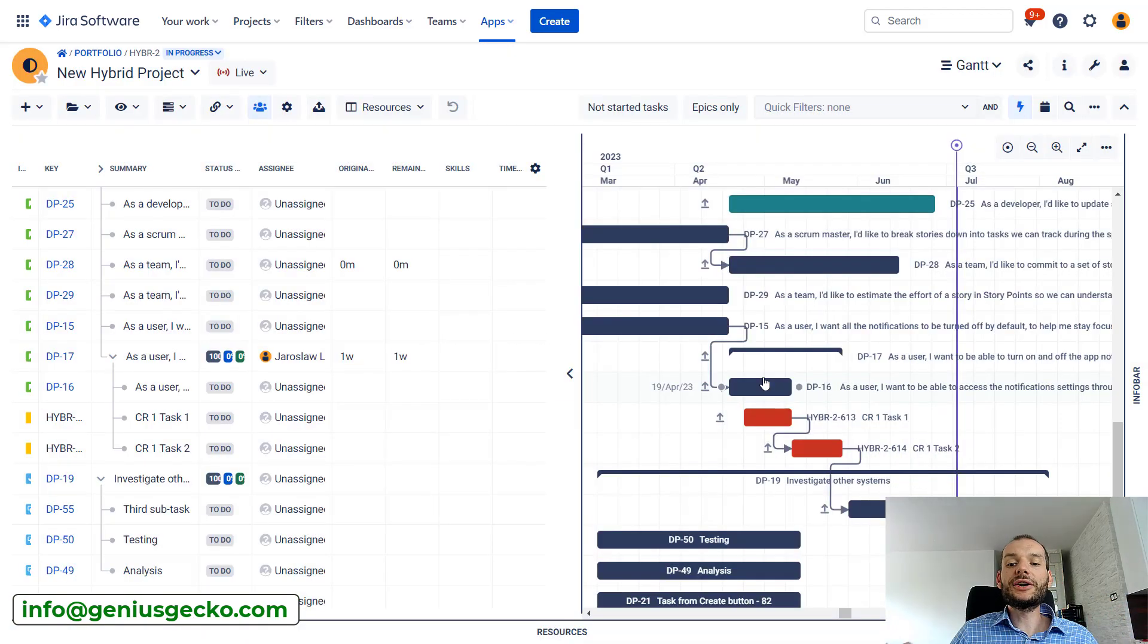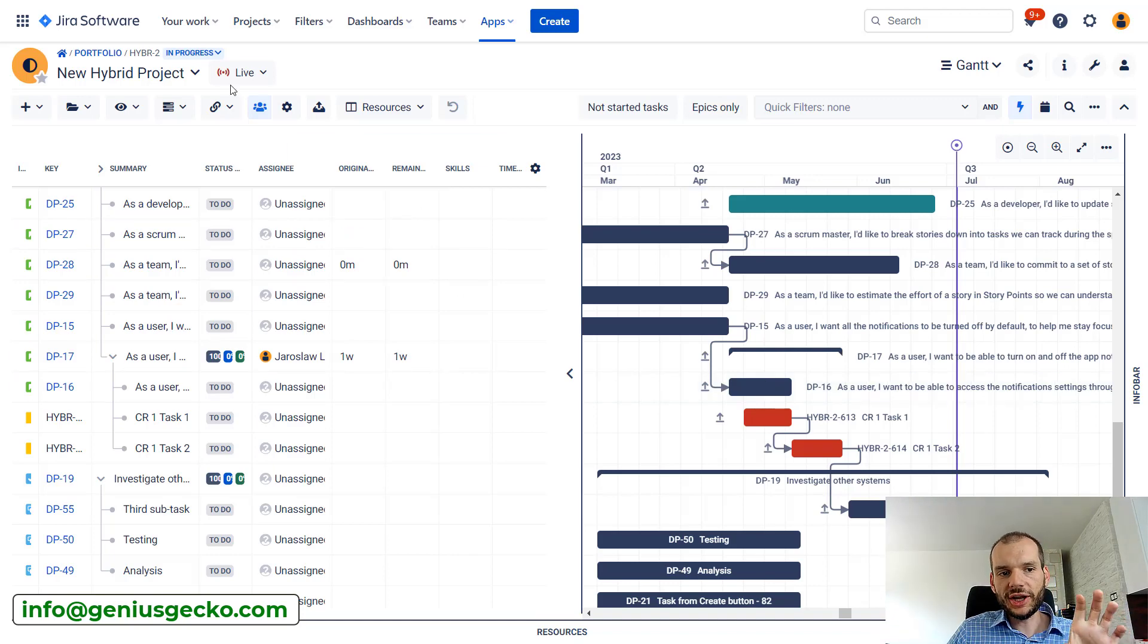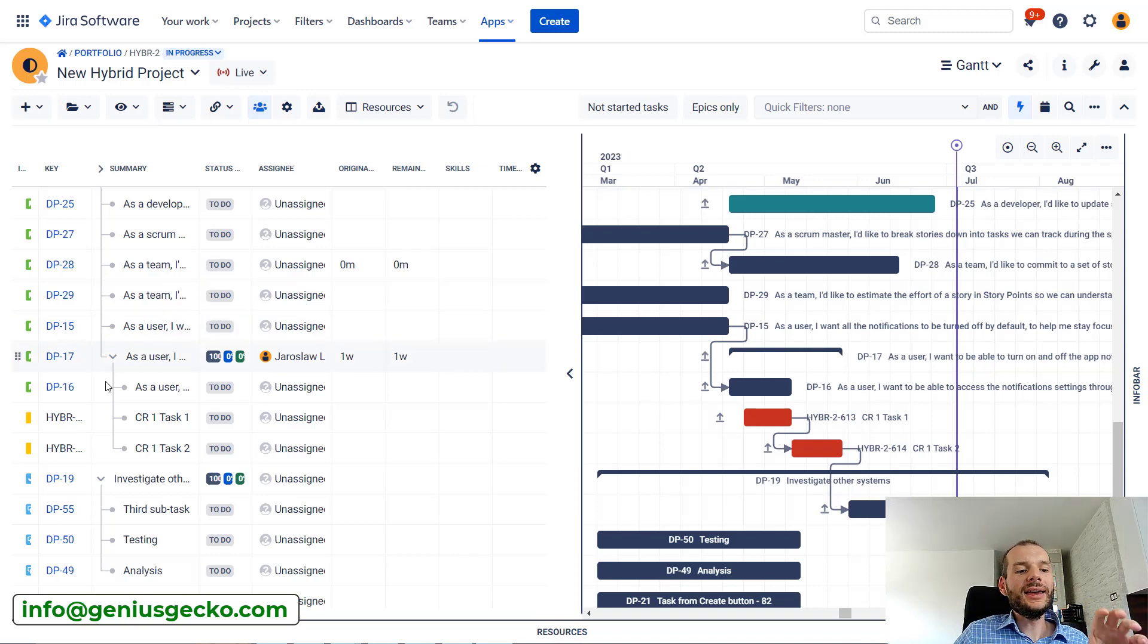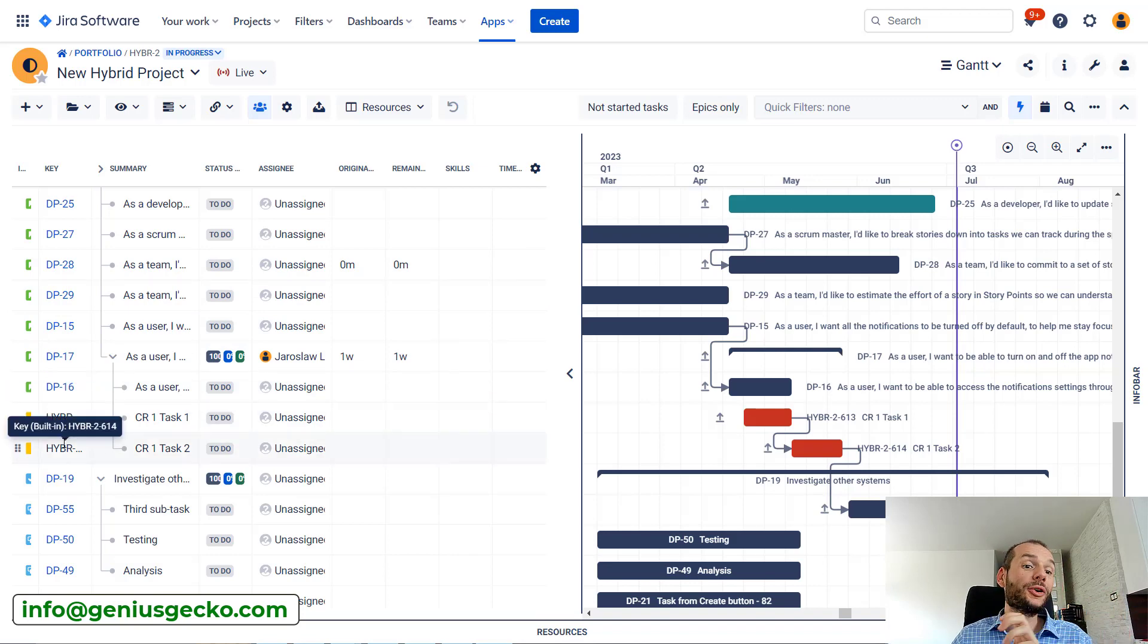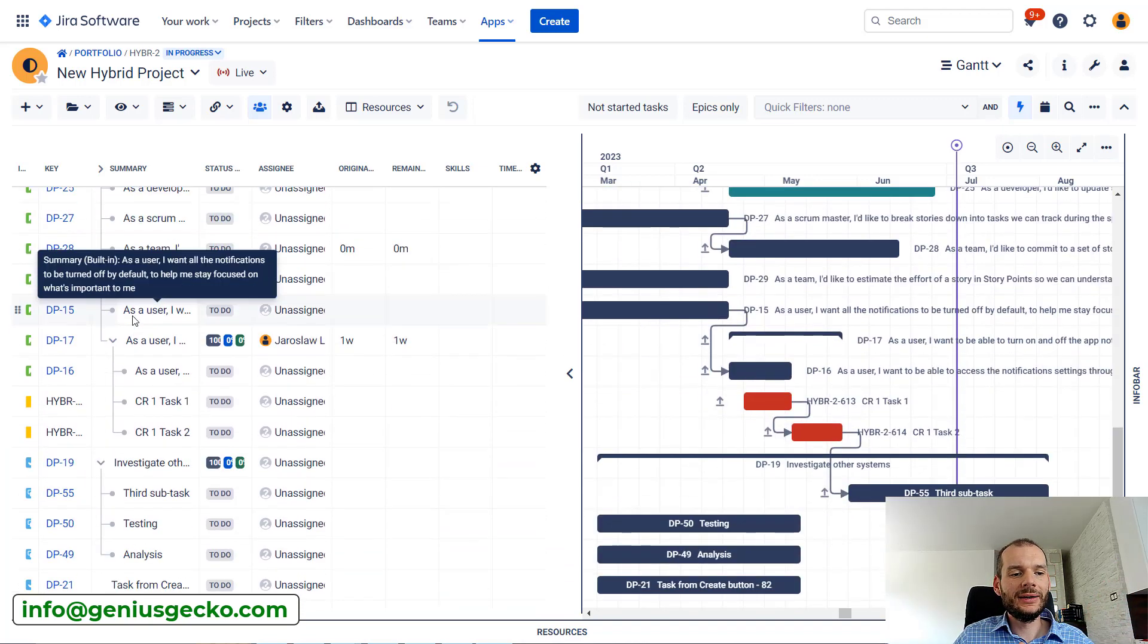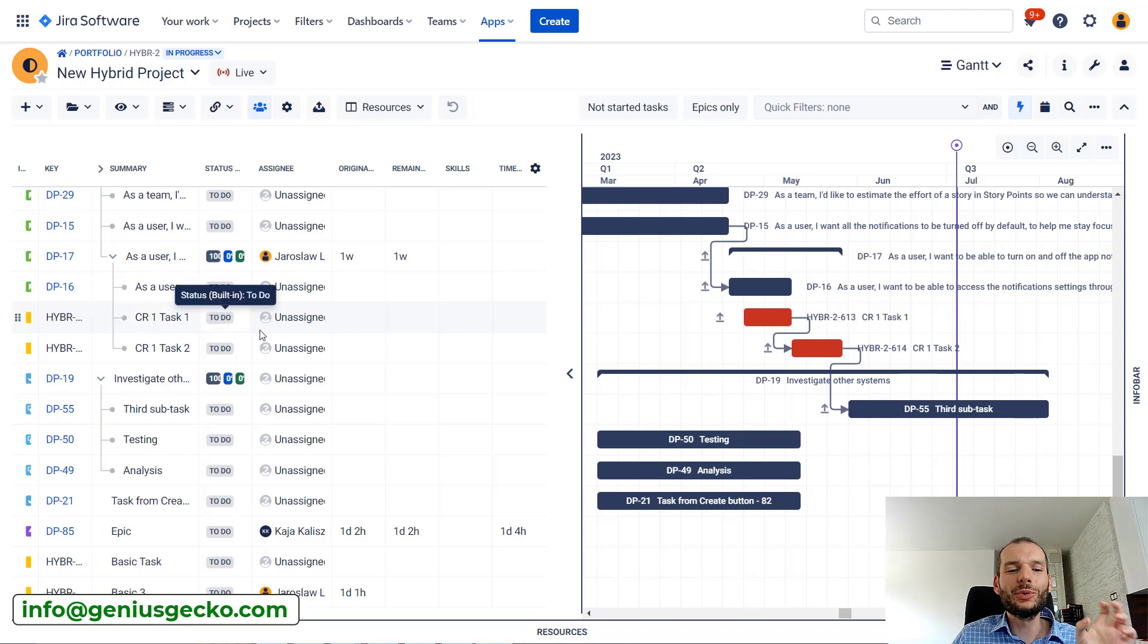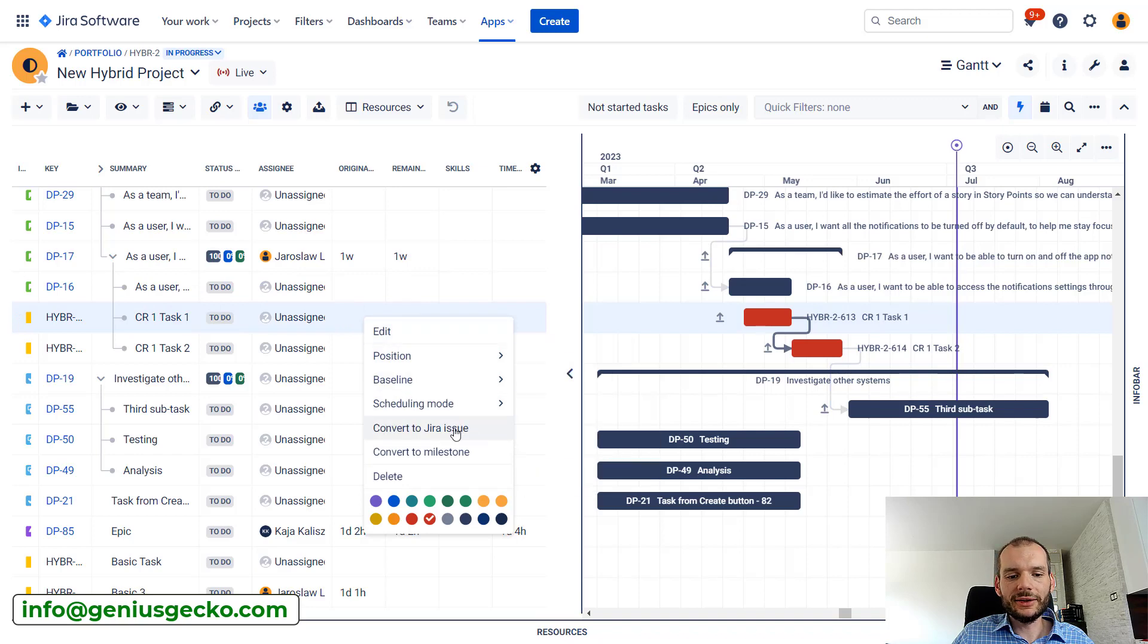The live scenario will be updated with all the changes we did in our change request one scenario. So now the last step we should do to finalize our new plan is to change the basic tasks that we created to actual JIRA issues. Because everything else is an actual JIRA issue. Probably this new work that was identified we want as a JIRA issue.